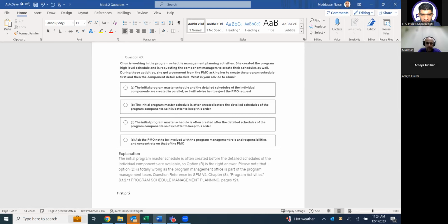Okay. What he's saying? Yeah, he's saying the same thing. The initial program master schedule is often created before the detailed schedule of the components. It's very clear. Whenever you talk about the components, it is in the program delivery phase. And a lot of activities I will be doing in the program definition phase. Yes. Okay. In our application also, first we write the program structure and then I go inside into my different domains about the components. So option B is the correct answer in this case. Okay.